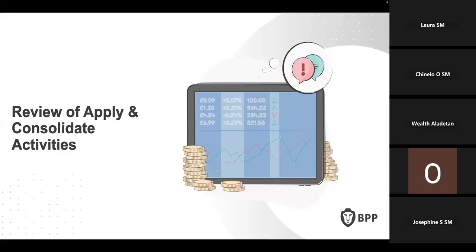Before you get to that point, they've written a risk assessment, and there's a mitigation plan already submitted within the risk register. It asks, what happens if your project goes on and one of your BAs falls sick? Will you close the project? No, we will not close the project. We'll go to team D and ask if their BA can double up for us for the next two to three days while our BA recuperates.